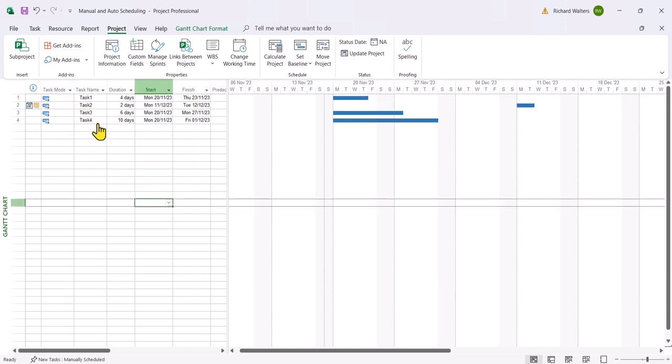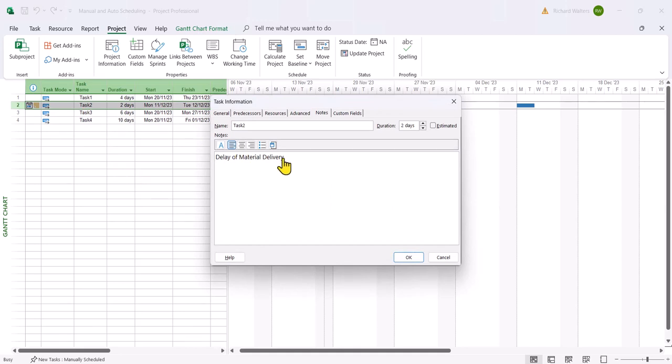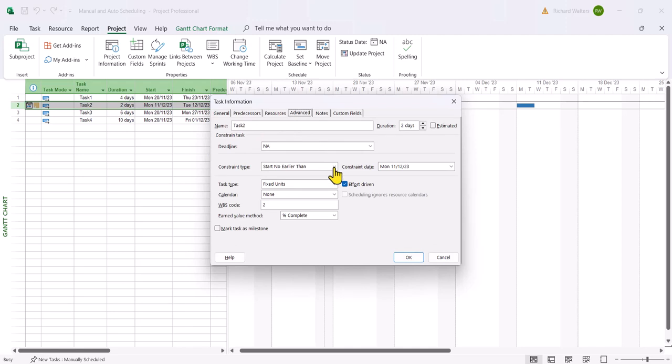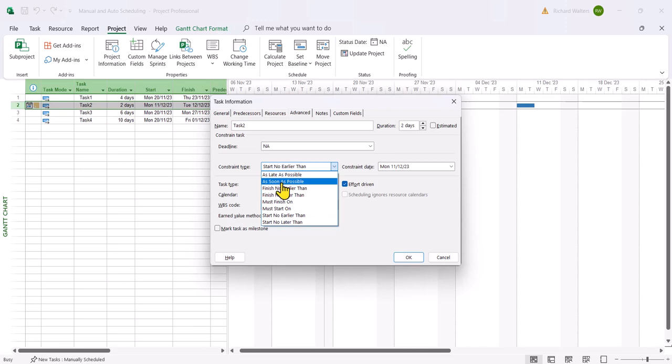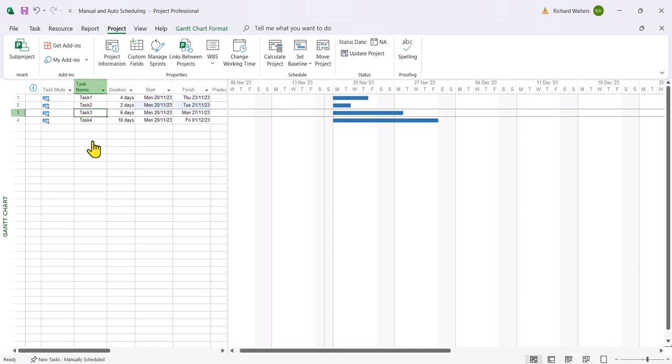If I wanted to remove the constraint with the auto scheduling I can just double click the task. I can always go to the note by deleting it. To delete the constraint it's as soon as possible and now it's back to the way it was. So automated gives you a lot of options that manual scheduling doesn't. So it's not to say that manual scheduling can't be useful, it can be at certain points if you want to control a task that's separate to a group of tasks that are linked together.